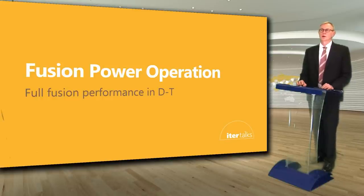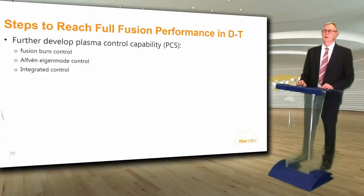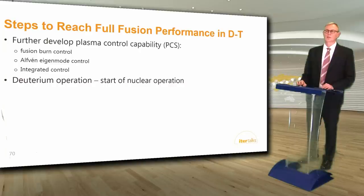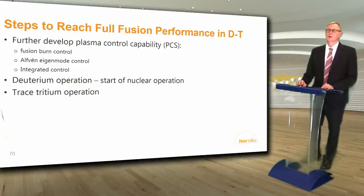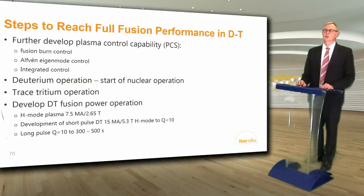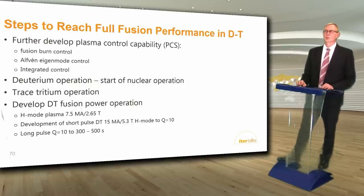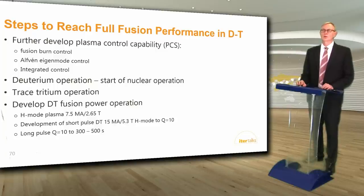Then we will have all systems ready to begin fusion power operation to achieve full fusion performance in deuterium-tritium. The steps to reach full fusion performance in DT are to further develop plasma control capability for fusion burn control, alpha-particle eigenmode control, and fully integrated control. Deuterium operation will start the nuclear operation phase, followed by trace tritium operation to ensure effective tritium procedures and measure initial transport, fusion power, and confinement changes. Then the tritium concentration will be increased up to a 50-50 DT ratio to maximize fusion power. The DT scenarios will include H-mode at 7.5 megamps and 2.65 tesla and short pulse DT H-modes at 15 megamps and 5.3 tesla up to Q equals 10, followed by long pulse Q equals 10 DT fusion burn up to 300 to 500 seconds.